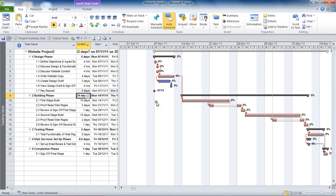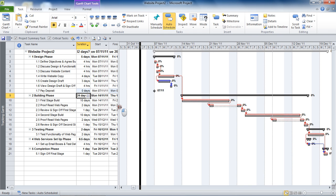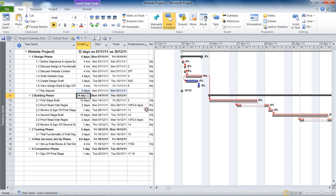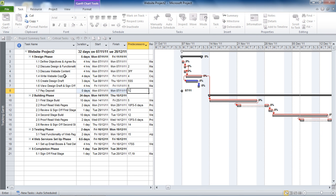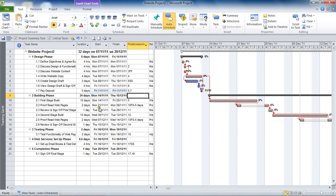These can be customised, but they are your default view of a milestone. At the moment it's on the project start date, so it does need to be linked in to appear at the correct stage of your project. I'm going to enter some predecessors in the predecessors column — task 5, 'Write Website Copy', and task 7, 'View the Design Draft and Sign Off'. They are the predecessors, and it now appears at the end of the design phase — that is the milestone task.